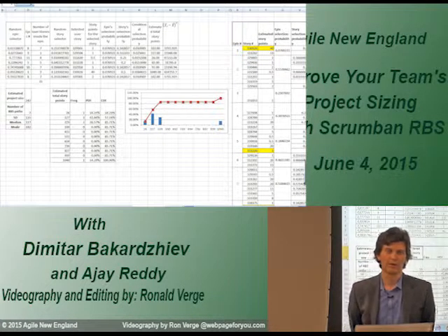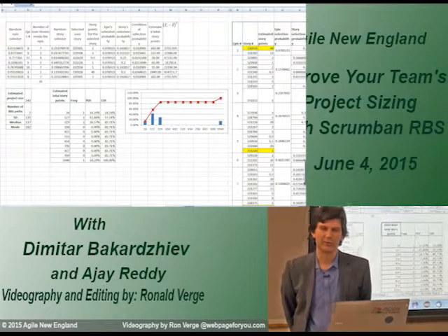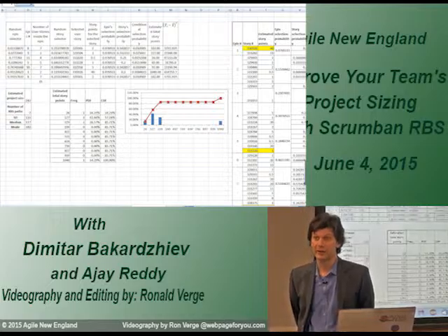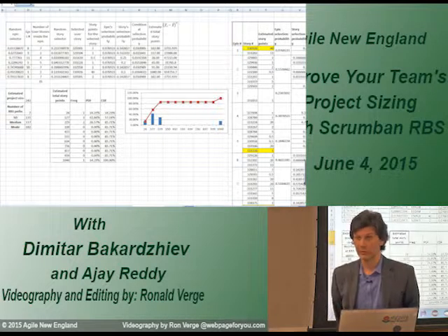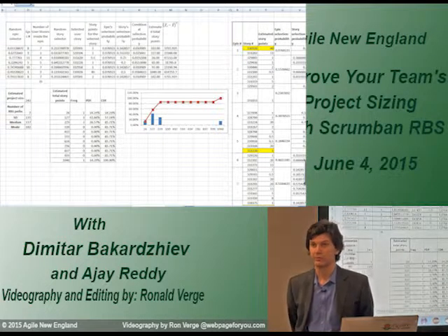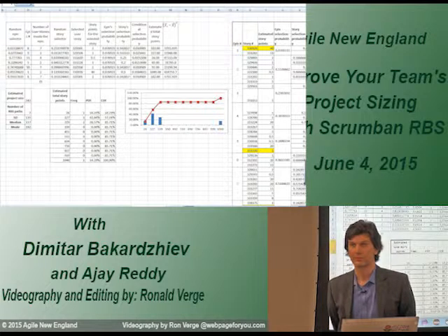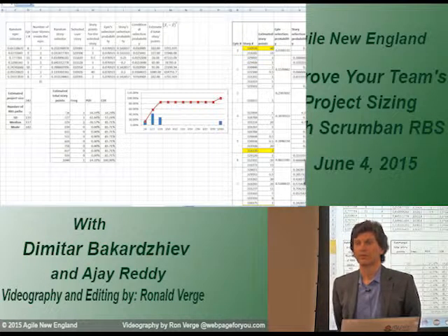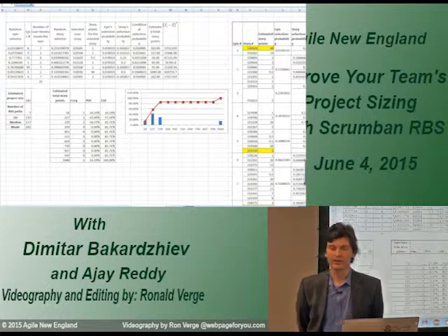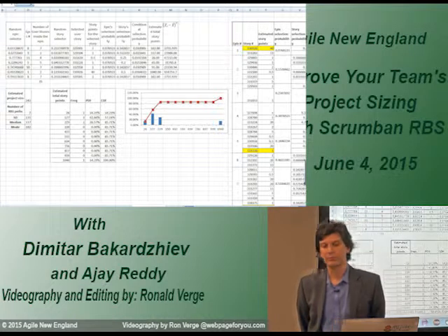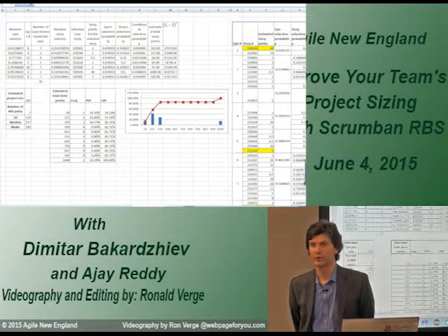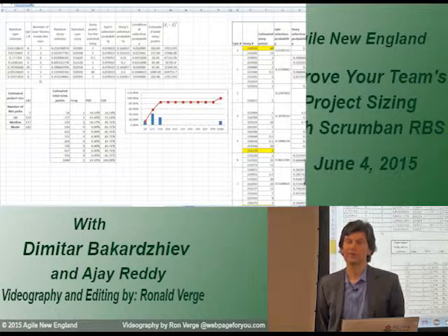No, it's not about percentage. The important thing here again is that we sample at random. That's crucial. Sure. I get the randomness factor, but if you sample 5 when there's like 5,000, that doesn't seem like it would be a reasonable enough sample. Yeah, I got the question. Between 7 and 12, that should be enough to produce a good average.